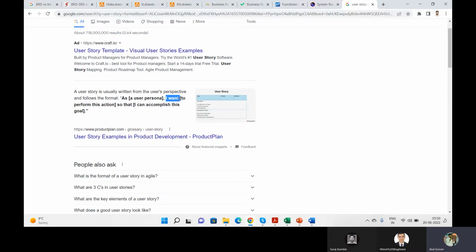As a product owner, or I can say as a web page product owner, I want to create 2 fields with the name called the username and the password, so that, benefit what you want to be achieved via this, so that my user can able to enter username and the password in the given boxes and able to log in into the tool.